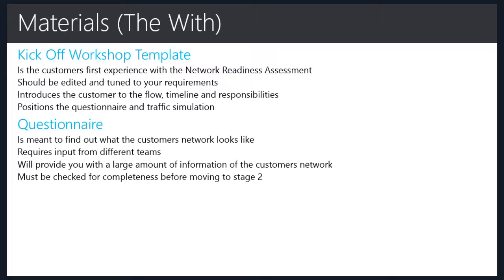It's a questionnaire that helps you identify possible issues and gives you a good overview. It will provide you with a large amount of information, and you must check this for completeness and for correctness of the answers before moving to stage 2, because in stage 2 you'll be basing a lot of the on-site workshops on this questionnaire.